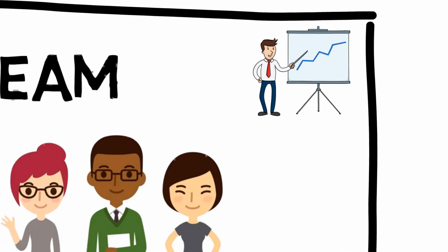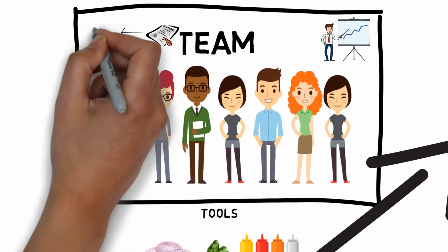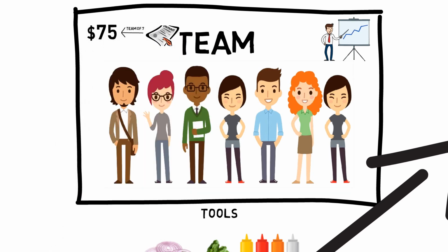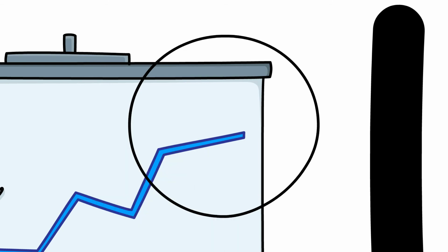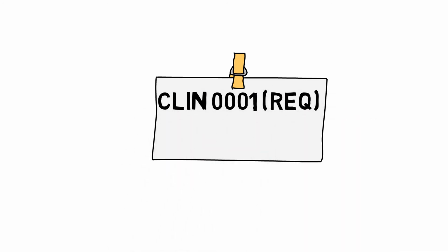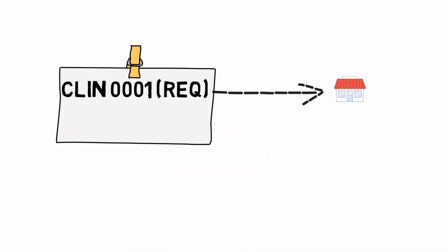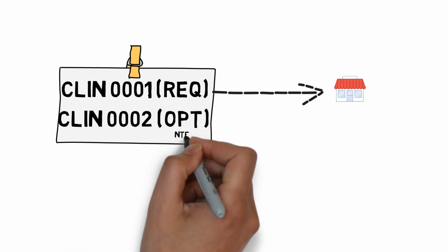For example, if we want to increase the capacity at our existing location, we can do this by selecting the pre-negotiated firm fixed price amount for, say, a team of 7, which will increase the capacity, or the number of orders fulfilled at our store. Let's examine a potential CLIN structure. Essentially, we could accomplish this with one required firm fixed price CLIN for our existing store and one optional firm fixed price CLIN with a not-to-exceed amount.